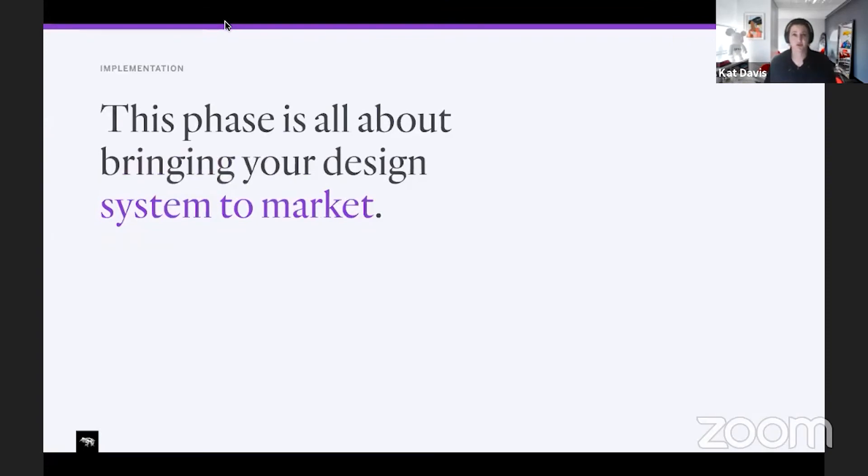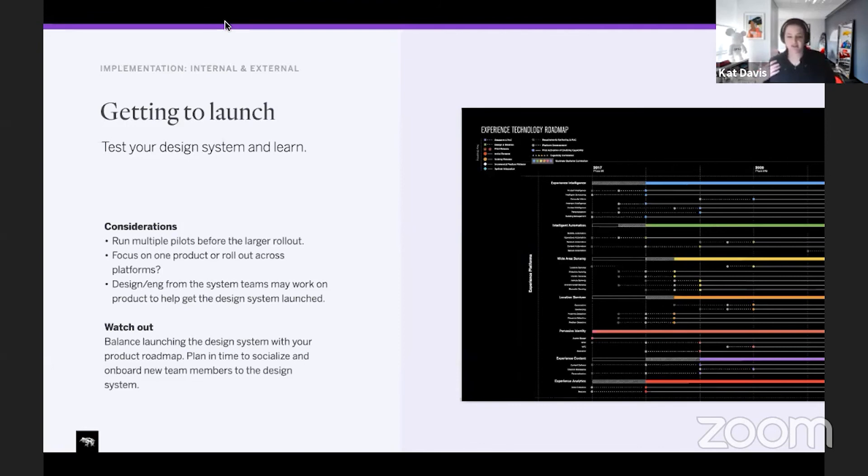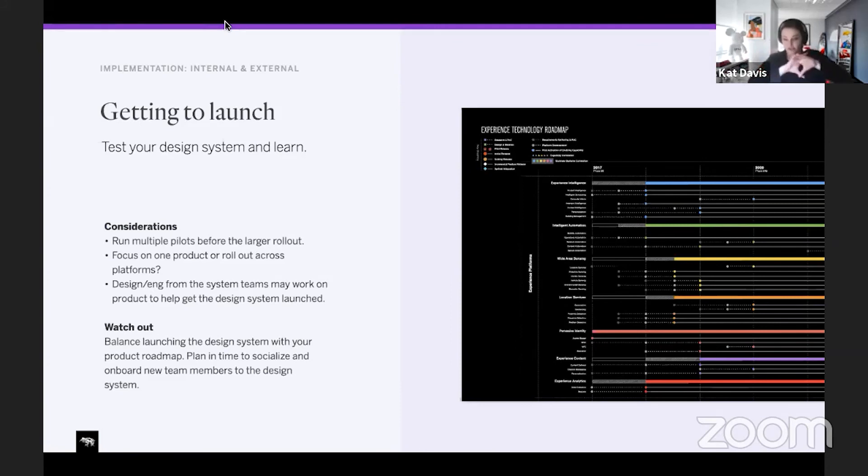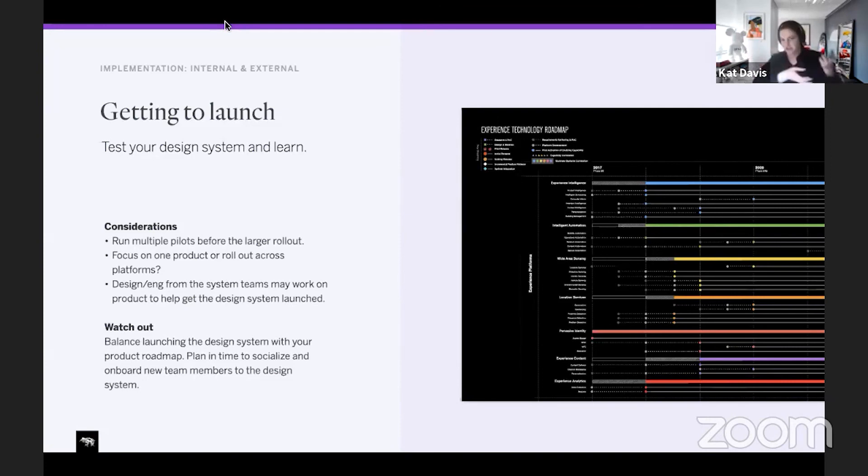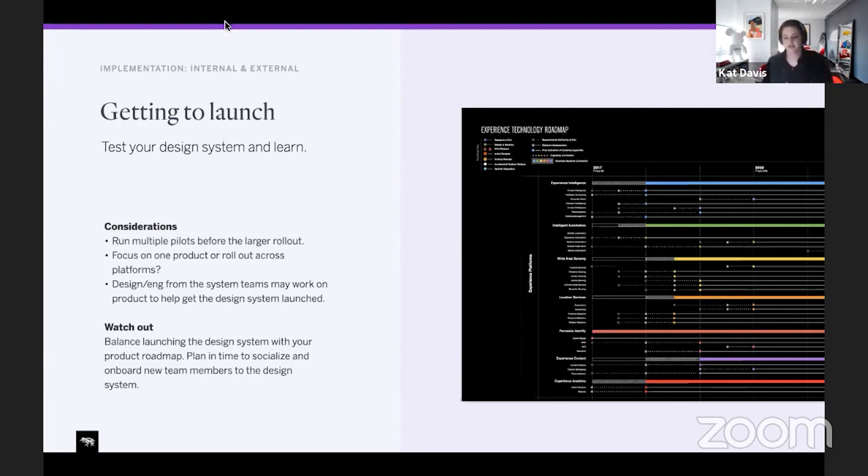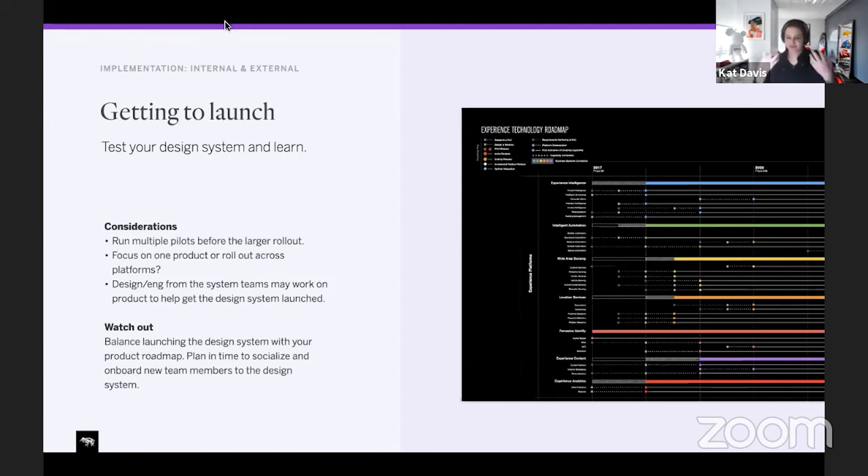So this is all about getting your system out to market. You want to run a few more pilots. I think there's two approaches to getting it to market. One is to focus on one touch point like mobile and let's roll out the entire design system in the mobile experience. Another approach here is to look at different platforms like mobile and web and if you have a kiosk, and look at what can we roll out on each of these incrementally. So let's say maybe the homepage, we start with that and do that across. Depends really on your technical roadmap, depends on your UX and tech debt, which approach you choose.